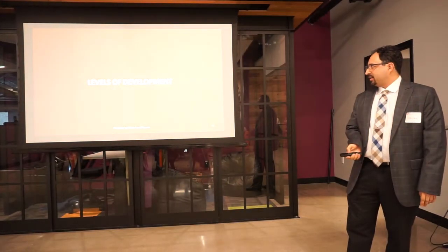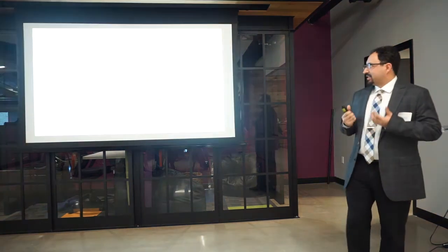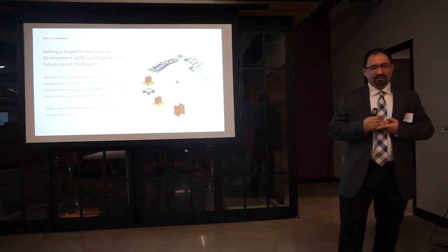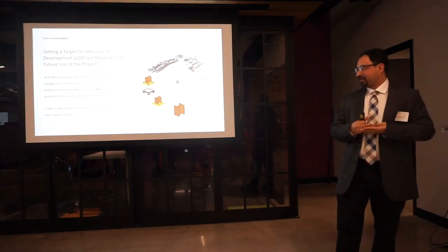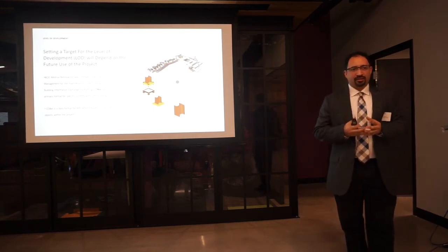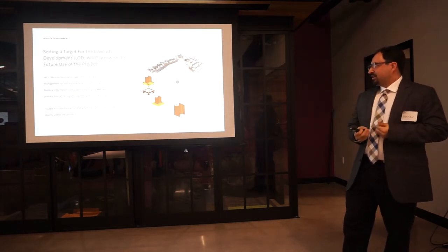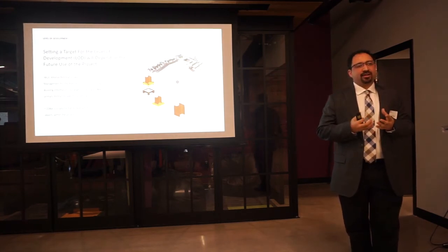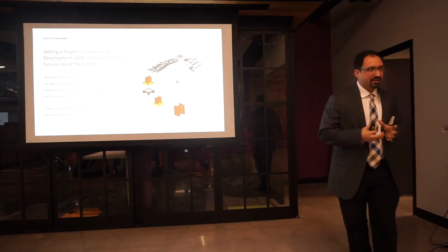So, in our execution plan, we also developed the levels of design in the project. We established the exact need for each firm's quality of their project. Level 100, 200, 300, 400, 500 are the typical levels of design. This all relates to COBie, which is the Construction Operations Building Information Exchange. This is a very important item to the client because it was related to their building management systems that they were intending to use all the information from our project for.